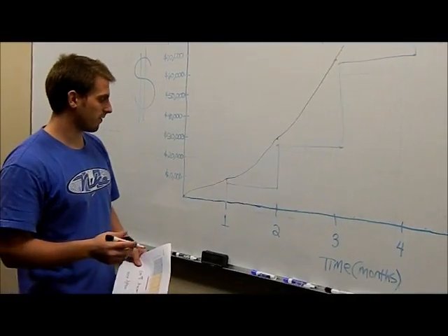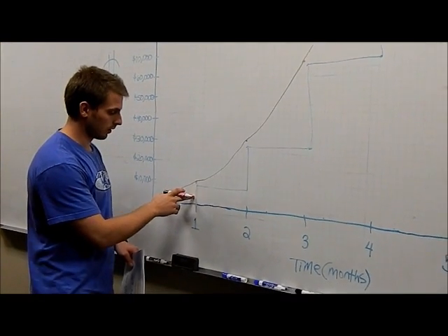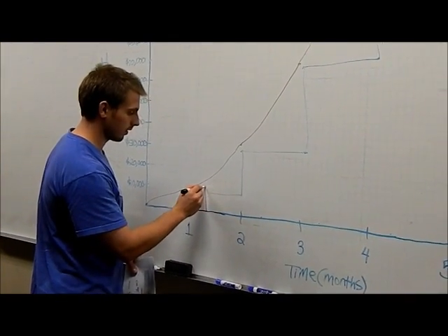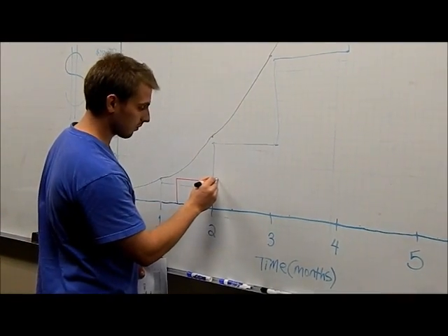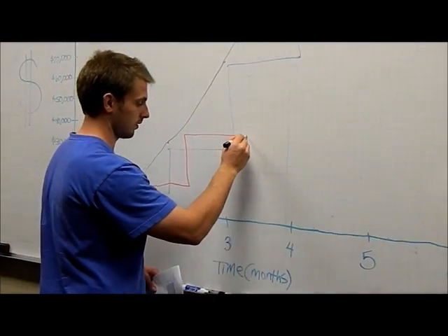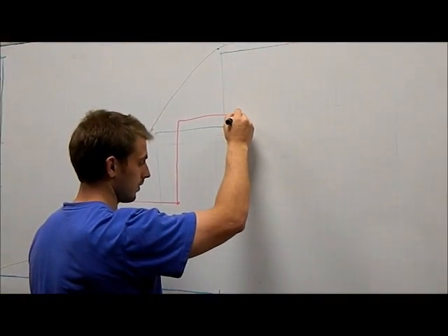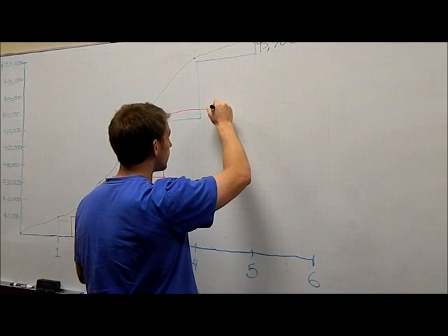All right, now we'll graph how the subcontractors get paid. So we get paid here at month 1. Several days later, we cut the subcontractors a check, less retainage. Same thing for month 2, month 3, month 4.